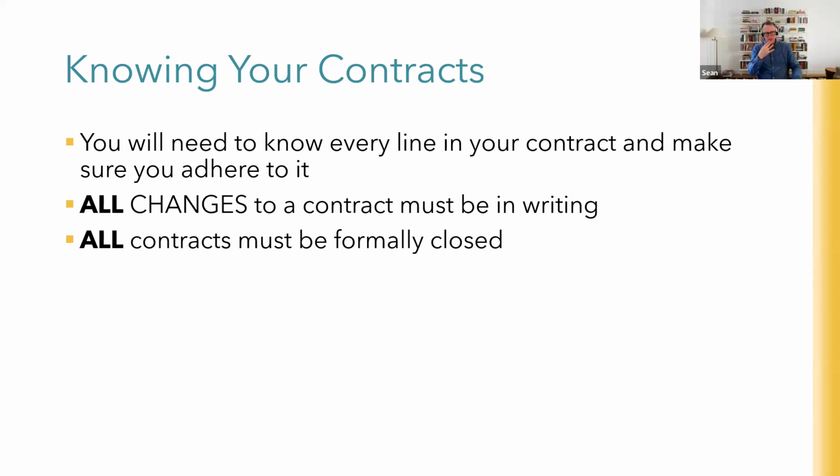And as I explained, I went, oh, heck. Oh, wow, I didn't think about that scenario. So we've just been chatting over the last 2 weeks. It's like, well, as it's written, this could actually happen. So you do find those sorts of things, but do read your contracts more than once, regularly. I know on big projects, I'll pull them out every month, just reread them again so I understand performance and termination and all of those things.